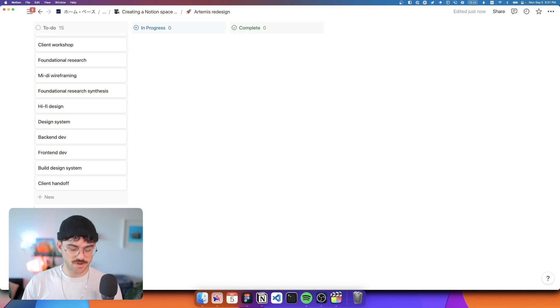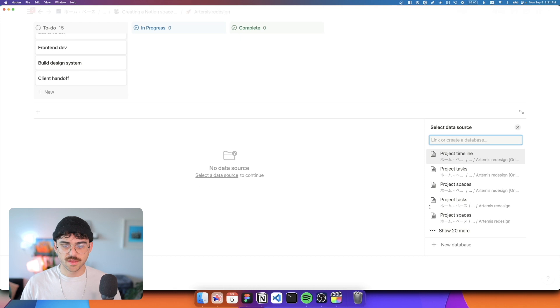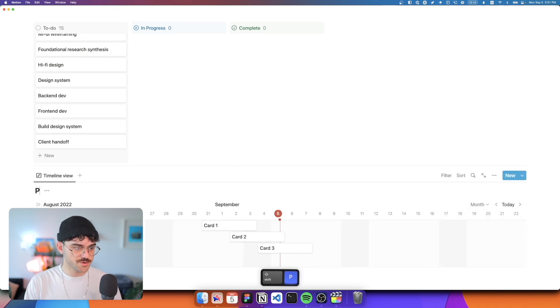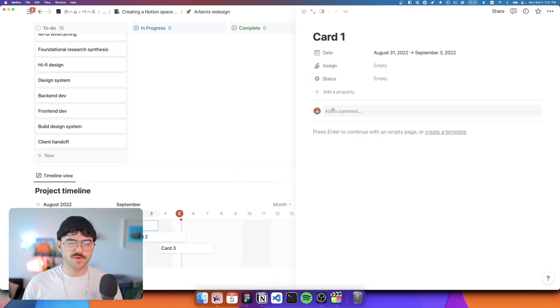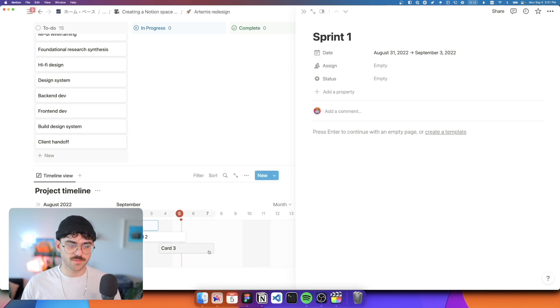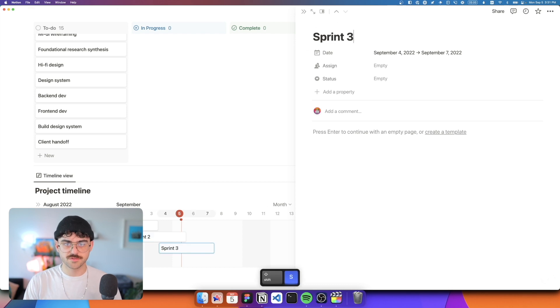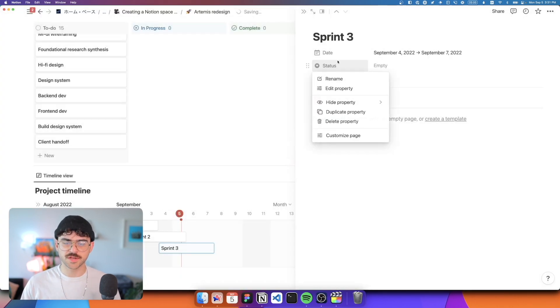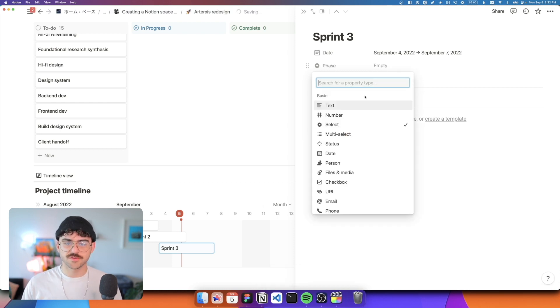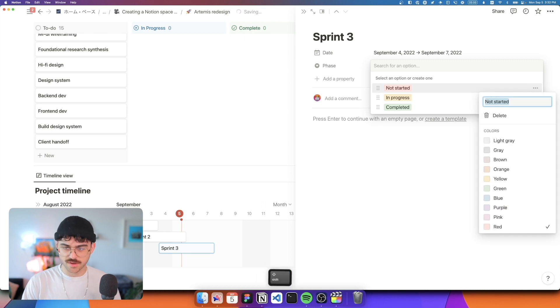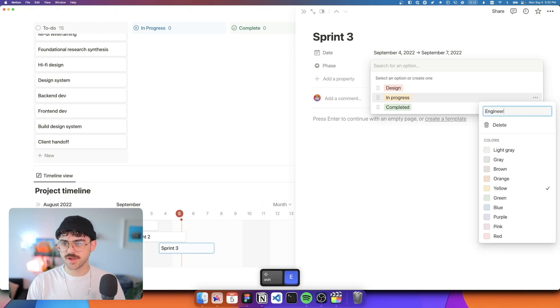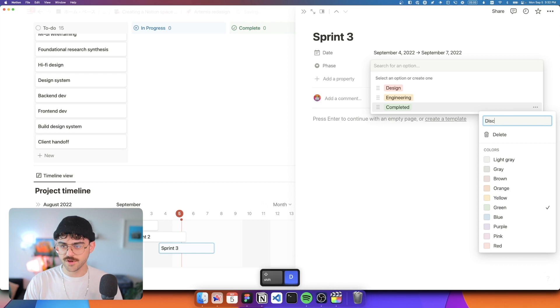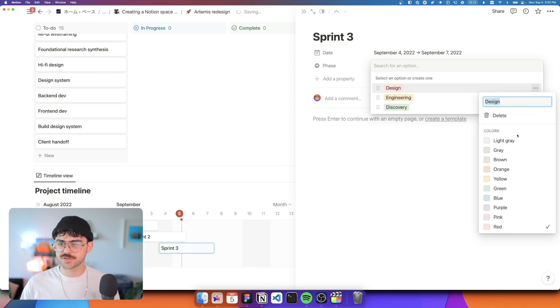And the next thing that we're going to do just underneath that is to create a timeline view, create a new database, and this is going to be our project timeline. In here, we may have different phases. So one thing you can do is split this into like sprint one, sprint two, sprint three. I'm going to delete these other properties for now. And instead of a status, I'm actually going to turn this into a phase, and it's going to be select, and then our options are actually going to be design, engineering, and maybe discovery. You could have research in here, whatever you need based on your project.